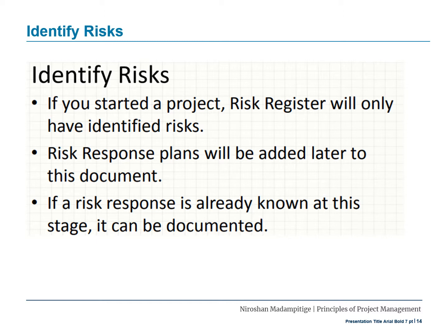Now let's have a look at how exactly you could identify the risks. If you started a project, the risk register will only have identified risks. Risk response plans will be added later to this document. If a risk response is already known at this stage, it can be documented.